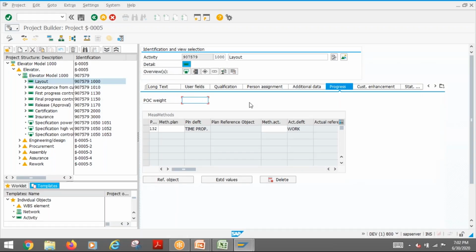But if my configuration is to calculate it manually, then I need to give a weight. In the weight there is one thing you need to understand: it won't allow any kind of fractions. So if you are thinking of fractions, then put bigger values, say thousands or 10,000.